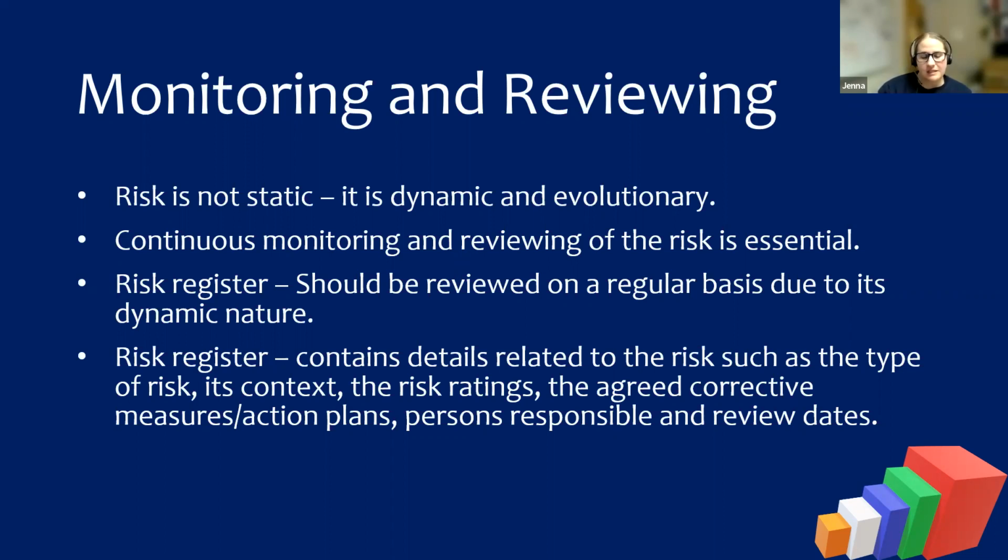Because like I said, sometimes when we put controls and mitigation in place, that's not going to be achieved overnight. So saying that I'm going to review it tomorrow is probably not a realistic review date. Actually, we probably need to review it in, say, a month or 3 months' time to see that it has been effective. If we can see before that it's definitely not working and we need to do something else, then we can do something about it.